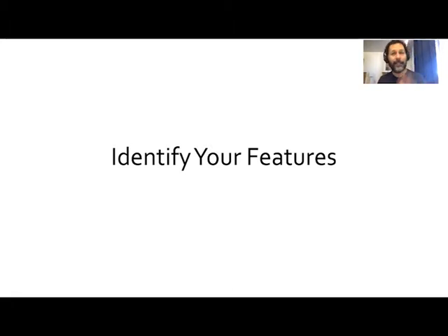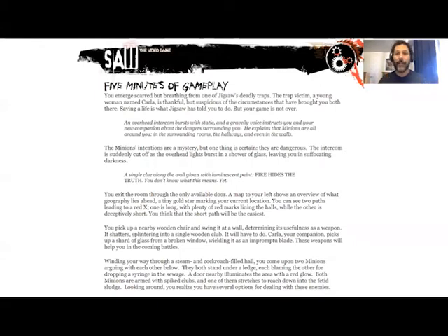But a really good way that I recommend doing it is to write out, longhand, not in bullet points, the first 5 to 10 minutes of the experience. This is a very common practice in all the industries in AET, because you're actually sitting down and thinking, what is the user experiencing from moment to moment for a full 5 or 10 minutes? Usually 5 or 10 minutes encompasses the totality of an experience in your project. And it helps you think through all those elements that need to be created in order to develop those 5 or 10 minutes.